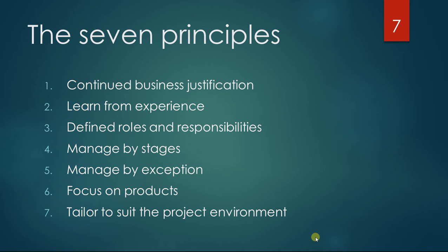And then the idea is, as long as you can deliver within your tolerances, you should just do the work. And if you exceed the tolerances, or you can foresee that you will exceed them, you should raise an exception and talk with the upper management level.